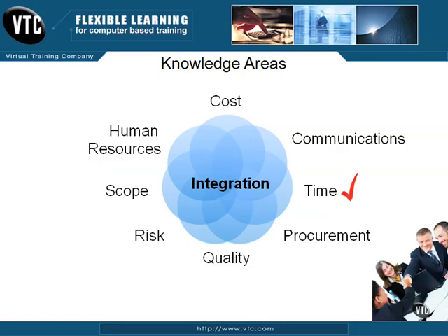Next is time management knowledge area. This knowledge area is concerned with completing the project on time by developing the project schedule and monitoring deviations from that schedule. There are 6 processes: define activities, sequence activities, estimate activity resources, estimate activity durations, develop schedule, and control schedule. In the real world, most of these processes will occur together or at the same time and not necessarily as separate processes.